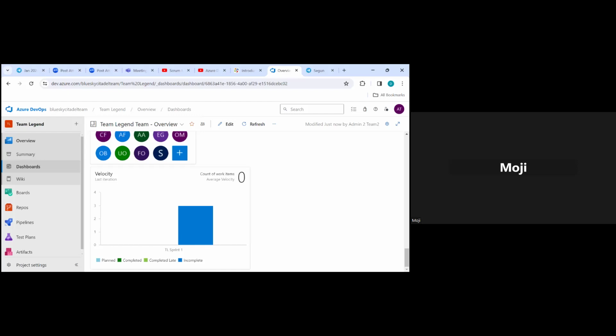So once it becomes 12:01 and you've not moved everything to committed, or even after moving it to committed, if you haven't moved them into sprints the way I showed you, you won't get the light blue planned bar showing. And that's what you really need in order to use a velocity chart, mainly to show that this is what we planned and this is what we completed. Okay. All right. So that's the velocity.